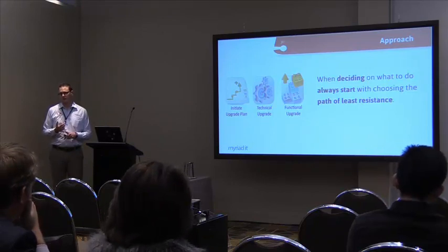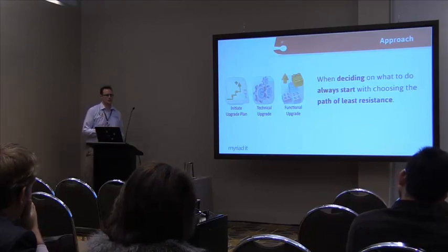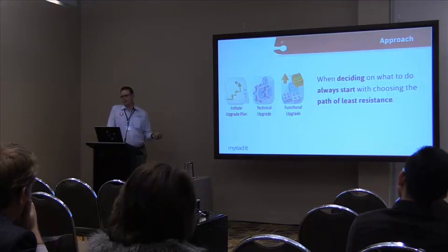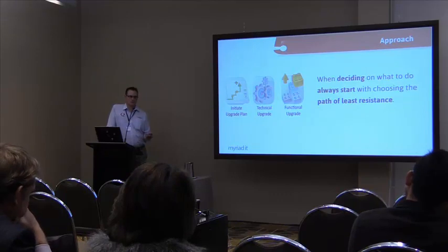A lot of projects fail because of the governance structure. They don't have any owners for the project. They don't have a steering committee. They don't have good project management. And then, because you have no governance, that's when your scope goes out. What are the people's roles and responsibilities inside that project? Clearly identifying all that information is just another part of putting the business case in place.